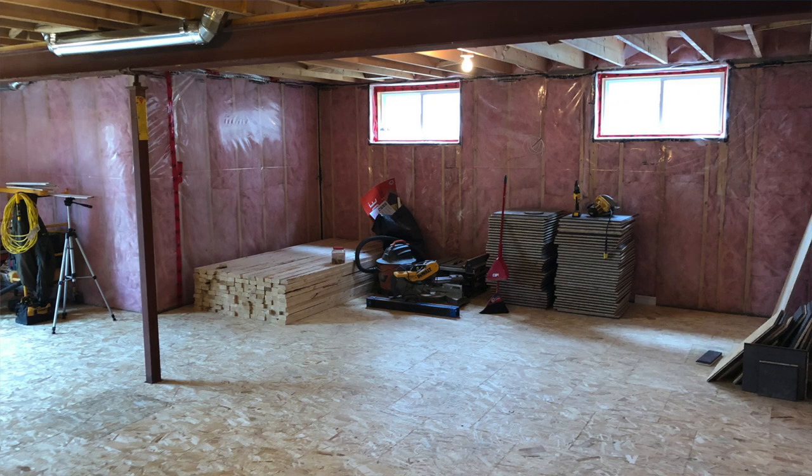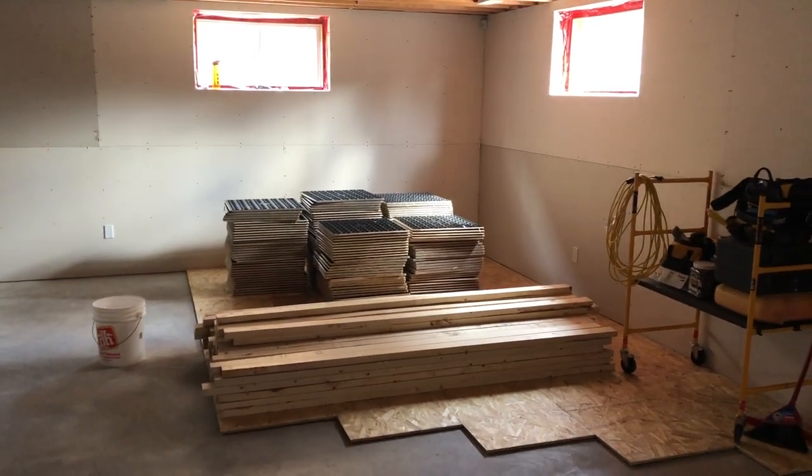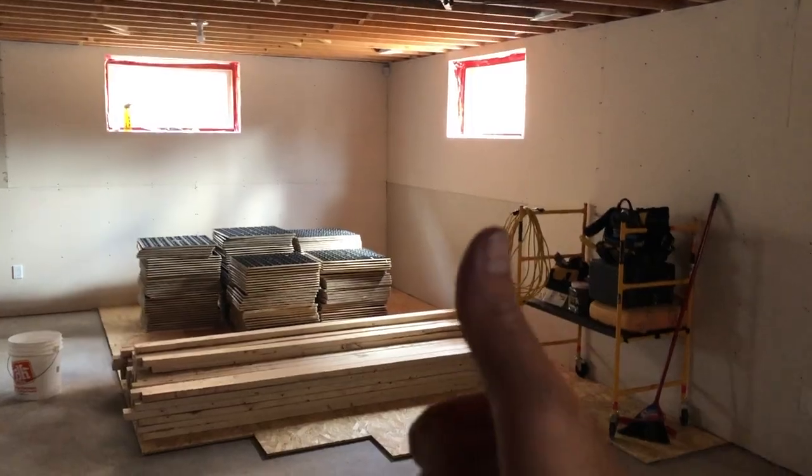What's the best location? I say, for example, with subfloor, I like to show up, lay like 20 pieces of it, and then put all my tools, the leftover subfloor on that, the framing on that, and now I can lay the rest of the floor, and I can then get the tools together, frame up the walls, and now I'm not going backwards, moving things over and over again. So any stage I'm at, and I'm thinking about it, I'm going to load all of these in. Okay, where are they going to go? I'm going to start over there.